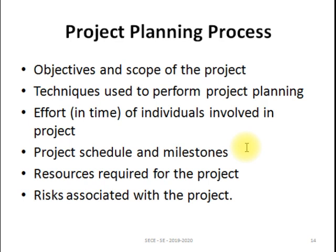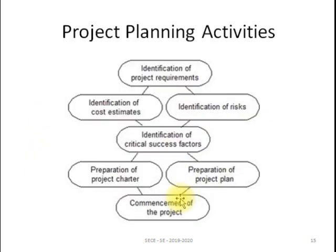The project planning process has six different steps. We calculate the objectives and scope of the project, then concentrate on techniques used to perform project planning, the individual efforts involved, project schedule and milestones, resources required, and risks associated with the project. When planning a project we follow these activities: first identify the project requirements, then proceed to identification of cost estimation and identification of risk. Requirements are given by stakeholders.